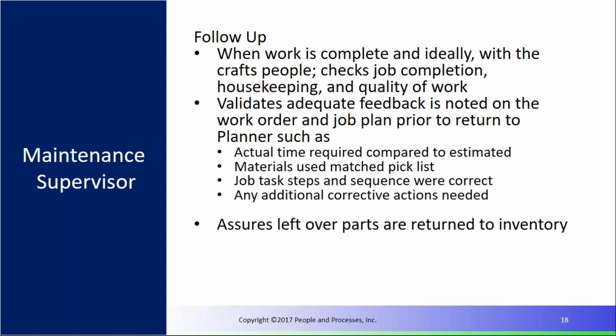The supervisors should be making sure that we give feedback. Hey, Mr. or Mrs. Planner, you estimated 4 hours for this, but once we got into the job, we realized it's 6 to 8 hours, or whatever the number is. That way we can correct the job plan for the next time. That's what's really important. And then we want to make sure that the task steps are right.